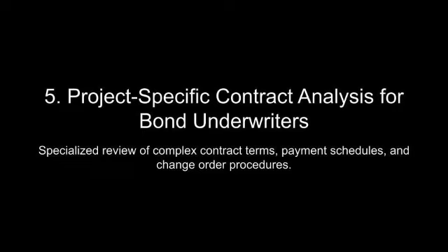Payment triggers tied to external approvals, such as regulatory inspections or third-party certifications, can introduce delays beyond the contractor's control, creating a mismatch between expected and actual cash inflows. Additionally, milestone schedules that fail to account for seasonal variations or supply chain disruptions can exacerbate cash flow risks. For example, in projects reliant on weather-dependent construction, payment milestones tied to fixed dates may create undue pressure on contractors, leading to rushed or subpar work and increasing the likelihood of bond claims.